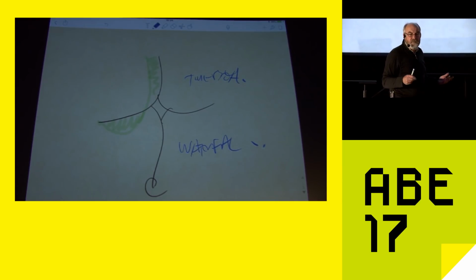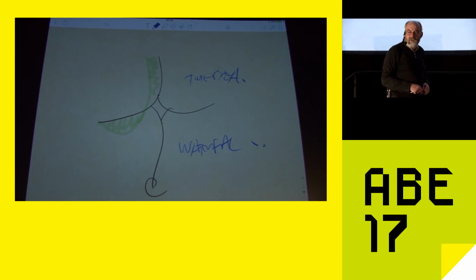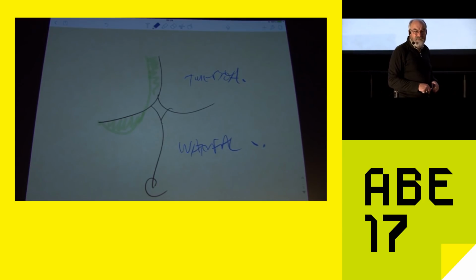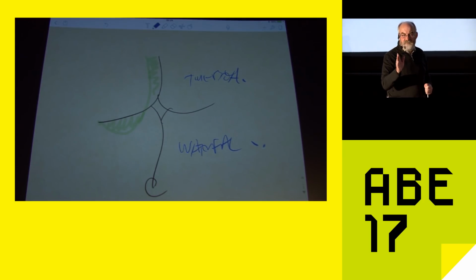I mean, just because a sprint is 2 weeks, it doesn't mean a time box can't be 3 months. We used to do a lot of this in the 80s and 90s. You know, I guarantee you a delivery date, but I'll vary the resource or the delivery to achieve it. And there are other techniques in that space. Again, what I'm trying to do is say what a framework should do is open up possibilities rather than constrain you to one way of working.